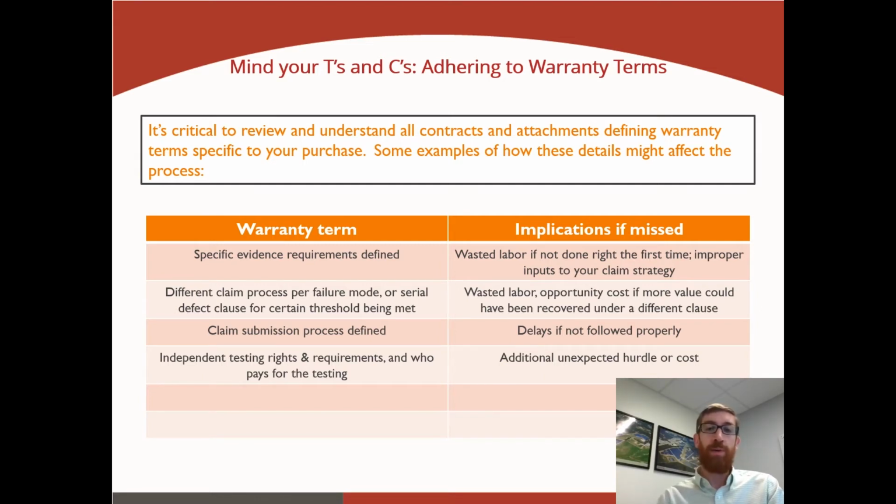And moving on, the claim submission process is important. It might be very straightforward, just, hey, send us the information, but it also might be very specific in terms of a specific physical address or email address that a notice must be sent to formally initiate a claim. And you could be wasting time if you didn't follow that process, because you might send the data, but you didn't actually start the clock on the formal claim process.